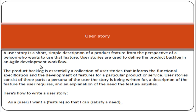Here is how to write a user story: "As a user, I want a feature, so that I can satisfy a need." So these three elements — the user, the feature, and the need — must all be included in the user story.